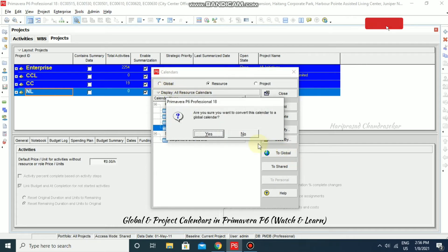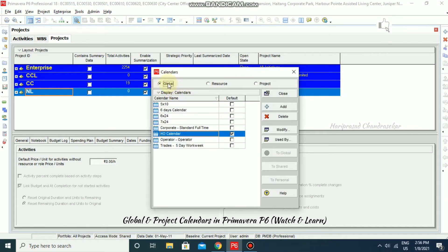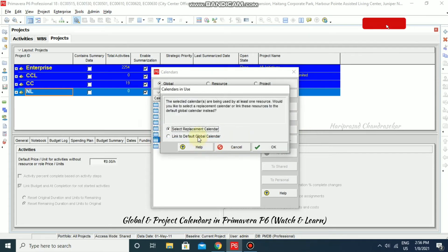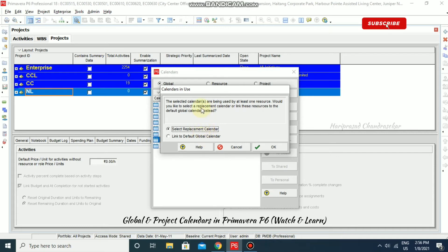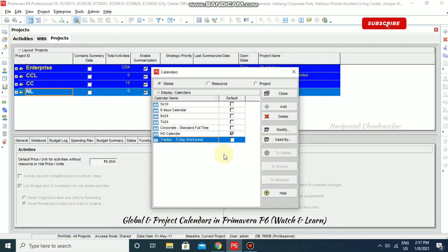After confirming conversion to Global, you can see the 'Operator' calendar now appears under Global. If you want to delete a calendar that is assigned to a resource, the system will prompt you to select a replacement calendar or link the resource to the default global calendar instead. Choose to link to the default global calendar and click OK — the resource will then use the default global calendar.